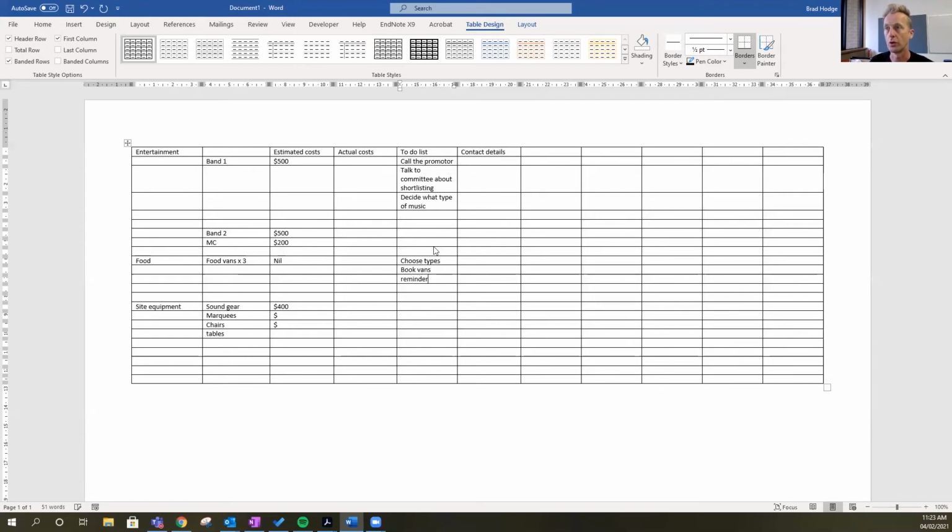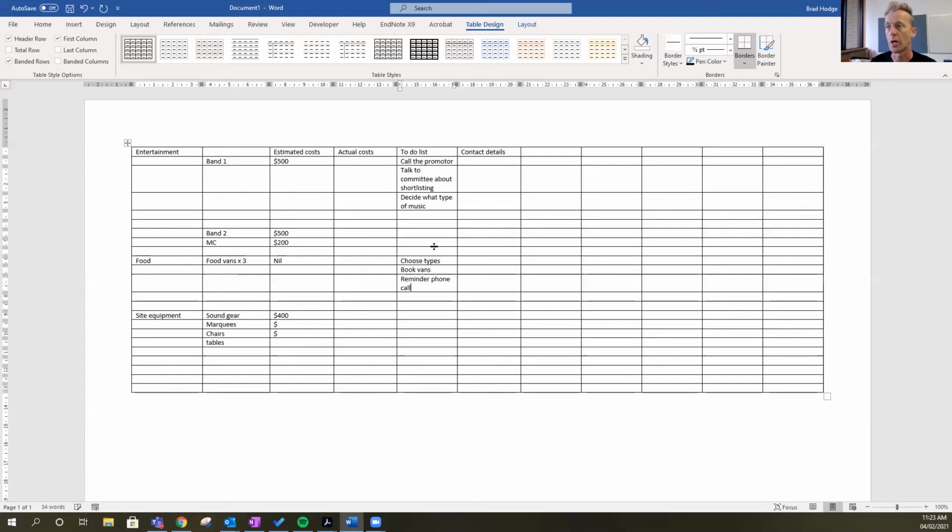So reminder phone call. Okay. Now this stuff may or may not end up in your Gantt chart, but I would recommend whenever you're doing community work that you come up with some really good excuse a week before the event to give just about everybody that's involved a call and say, hey, is there anything you need from me for next week? And you'll be surprised how often some of them go, oh my goodness, I forgot about that. Thank you for making the call. So plan a reason to call because you're often relying on volunteers. Come up with a good excuse to call the week before so that you don't get shot in the foot.